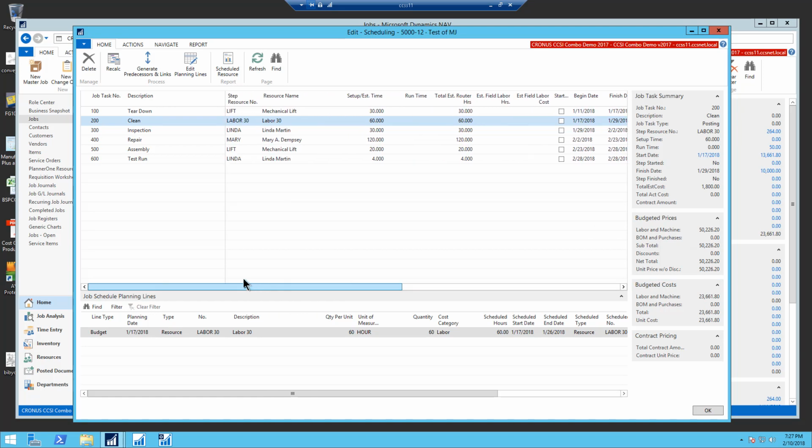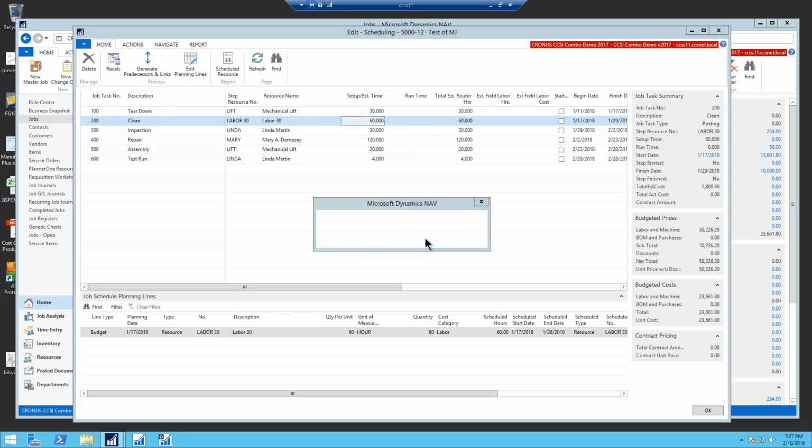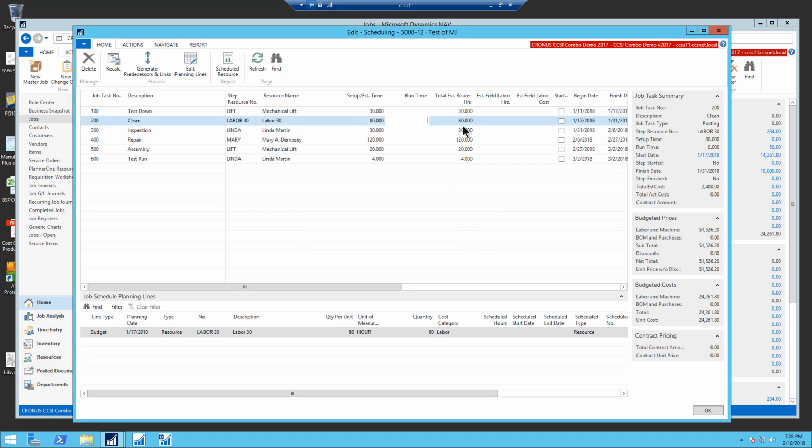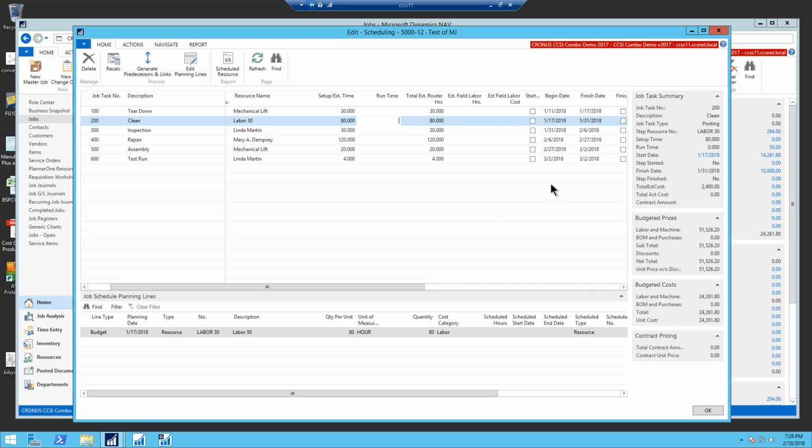Okay, so here's what I want you to see. So you come in and say, okay, well, the 60 hours, it's not 60 hours. I'm going to change that, and it's really going to be 80 hours. So I want to be able to freely change the 60 to an 80. So I say yes and recalculate the remaining steps. So basically, when it's doing the remaining steps, it's saying this 80 hours now is pushing this due date out in the future because this one task from this point forward is extending the duration of that job. You see what's happened? So now the due date, the finish date is out here.